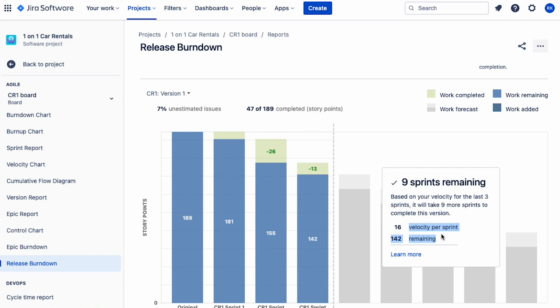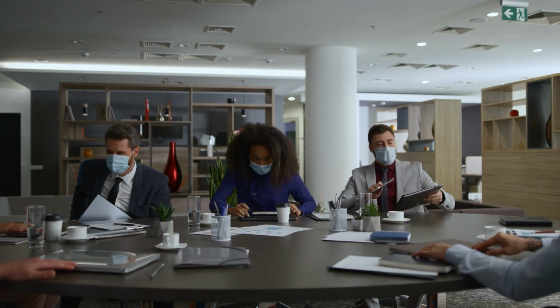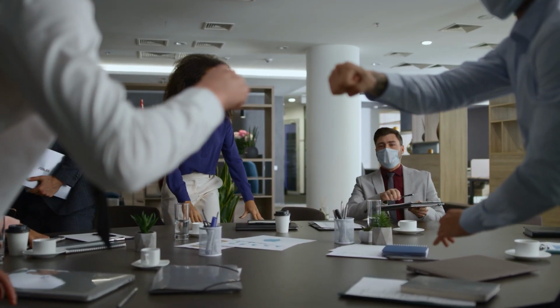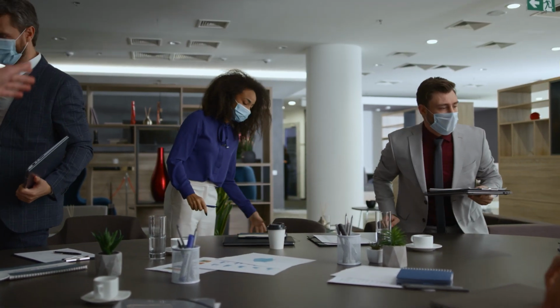Again, I'll create other videos going through these in more detail. And remember, it does rely on those estimates being applied to your product backlog items for these reports to show useful information. But if you have that in place, then again, this can be a great way to show your stakeholders when those releases will be done by. Okay, so that's typically how I'll wrap up a sprint review. Just have the product owner talk about the release and whether we're on track or not. And then at the end of the sprint review, we'll say, thanks stakeholders, you can leave now. Okay, we're going to do a sprint retrospective.